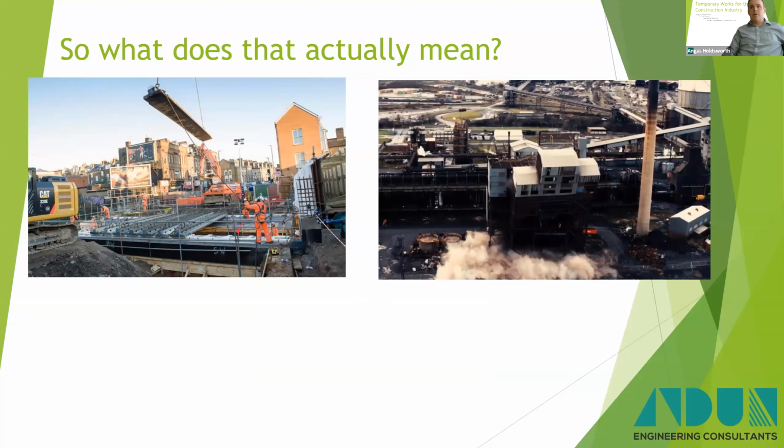This bridge, which is typical of some, the original deck actually formed a prop between the two abutments. That was replaced in the temporary condition by a working platform that we built in there.